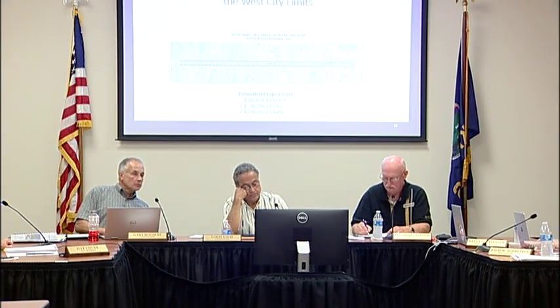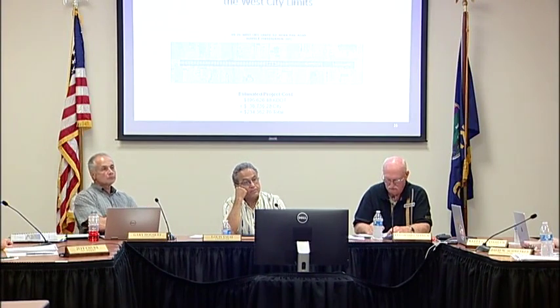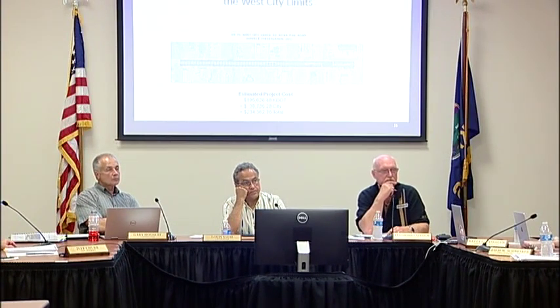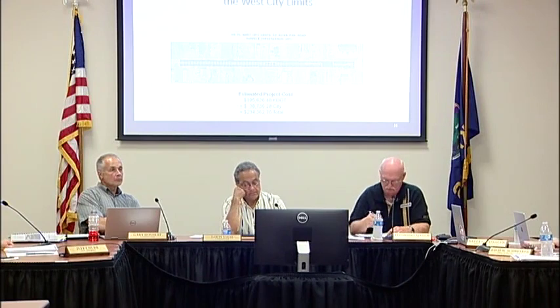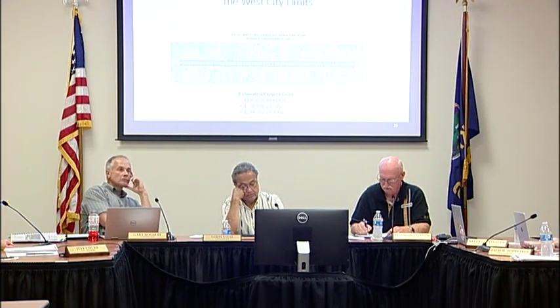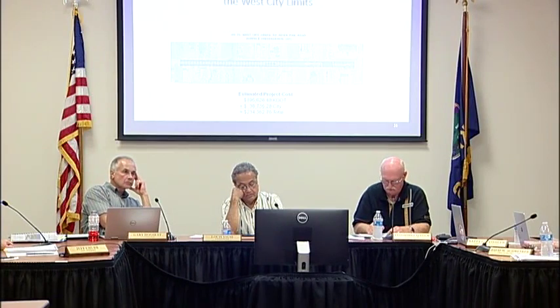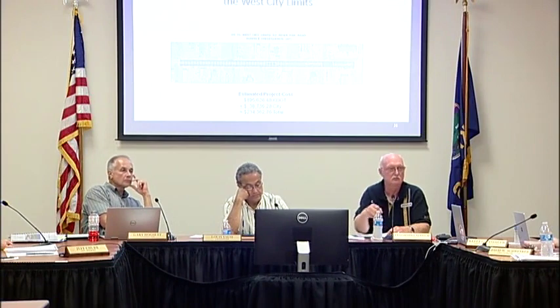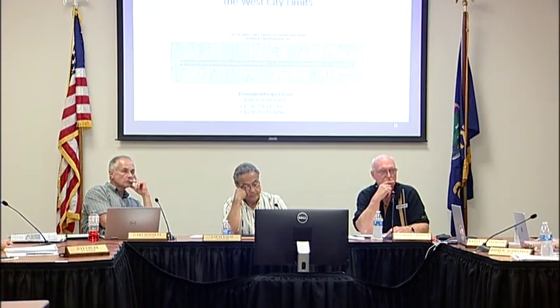In the C-CLIP grant process, you send in your grant application, then a group of KDOT engineers and administrators visit the city and review the project. The people representing KDOT felt this was a good candidate for a white topping project at the intersection due to the amount of rutting at the Peter Pan and West Main intersection. So they allowed the city to revise the application so that it could cover a white topping. So that increased this project.